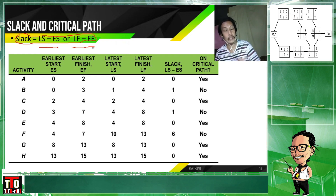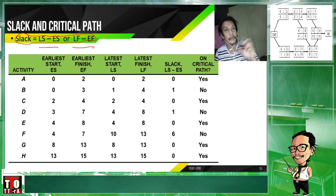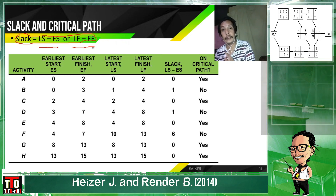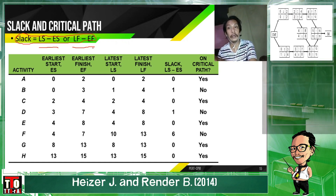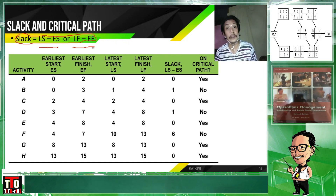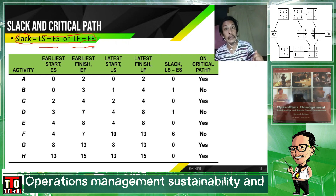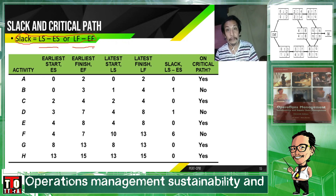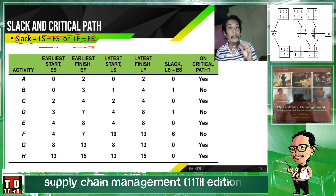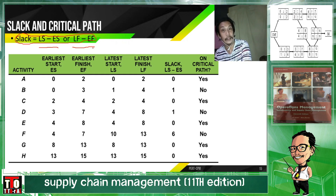Believe me, both formulas should arrive at the same value, no matter which of the two you choose. It should be the same value. If it's not the same value, there is an error in the network — we need to go back and check the network.